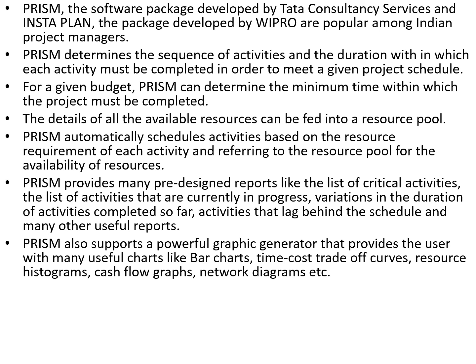The steps are enumerated as follows. Divide the project into tasks. All the project management functions are based on division of the project into constituent tasks. The duration of each task must be estimated to determine a realistic project schedule. Determine task dependency and interdependence. Develop the network diagram and Gantt chart.